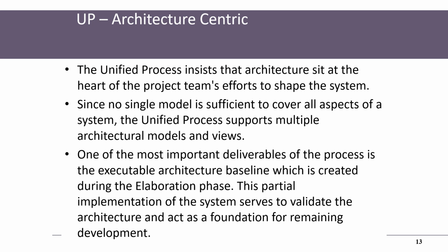So the most important thing: initially they may come up with an architecture, but some modification could be done and people may do some changes, but at one point, that is where the elaboration, what they call the baseline, they fix, okay, this is what we are going to use. So once you agreed, signed off, that's what we call baseline. After that, you have to live with that. It's a marriage.